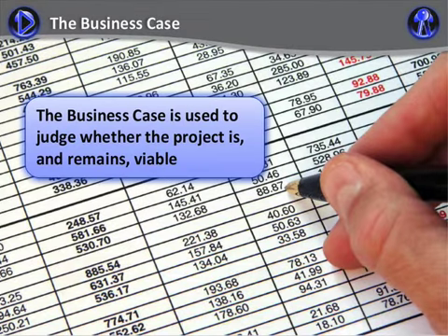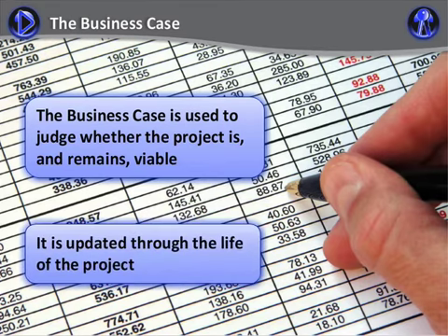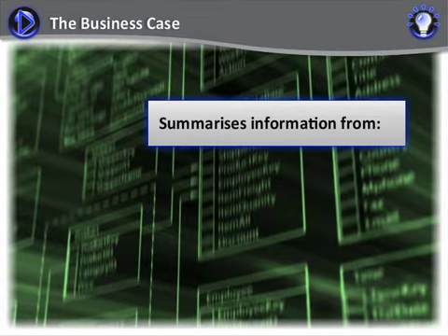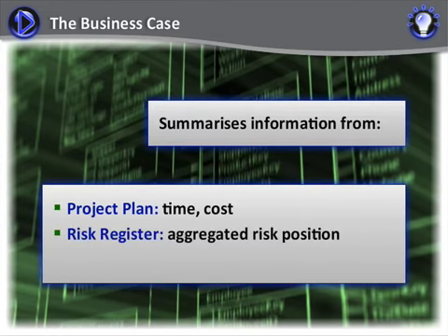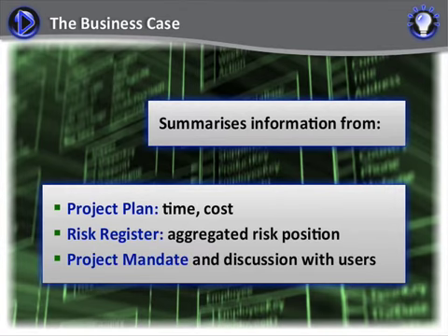The business case documents the information used to judge whether the project is and remains viable. It is maintained throughout the life of the project. It summarizes information from the project plan, time and cost to deliver, from the risk register, the aggregated risk position, and from the mandate and subsequent discussions with users to define the benefits.